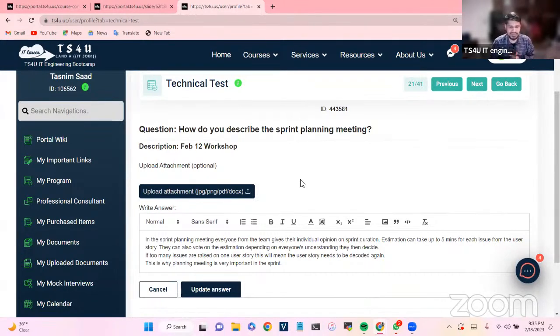We work maximum 70 hours or 65 hours. Why? Because we go to meetings. So you need to ensure you are not crossing more than 80 hours. If you take 7 user stories, each taking like 10 hours, then only can you work 7 user stories.